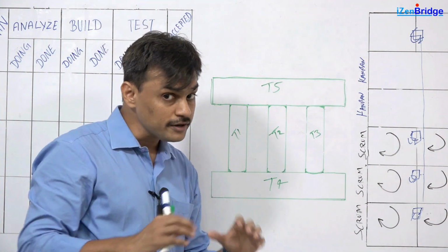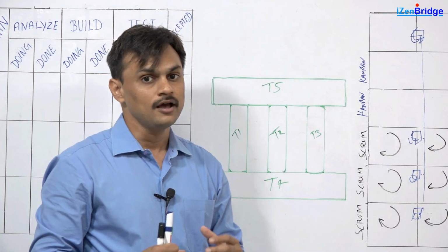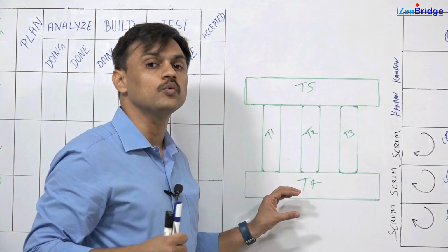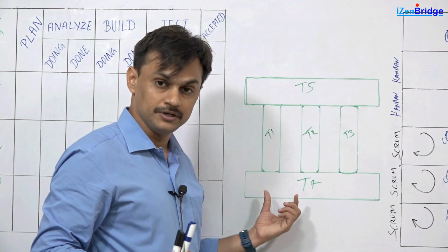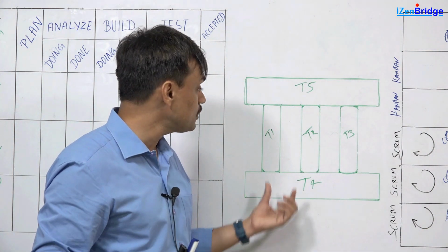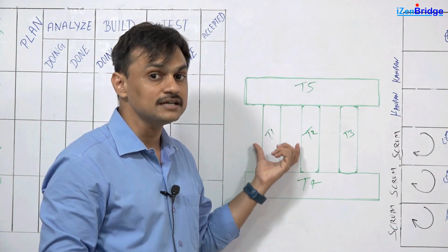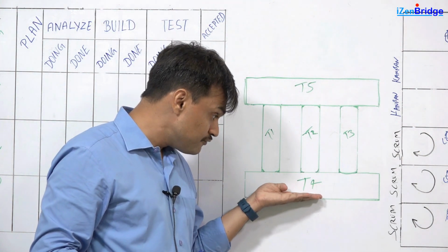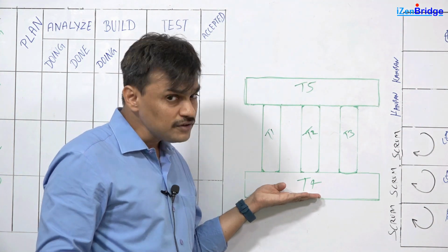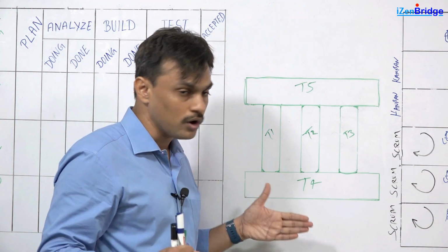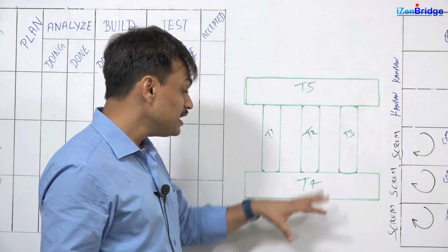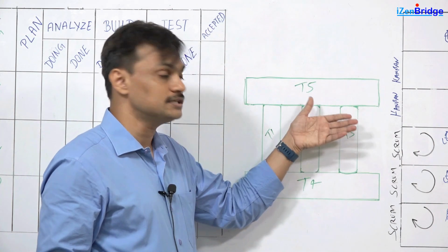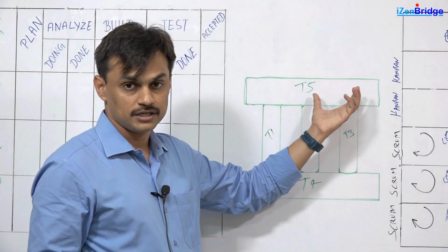Now, I am not at all recommending that they have to use Kanban, but if you see that the team finds it difficult to predict their work for 2 weeks for a sprint duration because their work is dependent on other teams' events. If other team faces some issue, other team faces some clarification, the team gets impacted, and it's difficult for them to predict the work with certainty for 2 weeks. In those cases, they may start using a flow-based system which supports other teams to achieve their own sprint objectives.